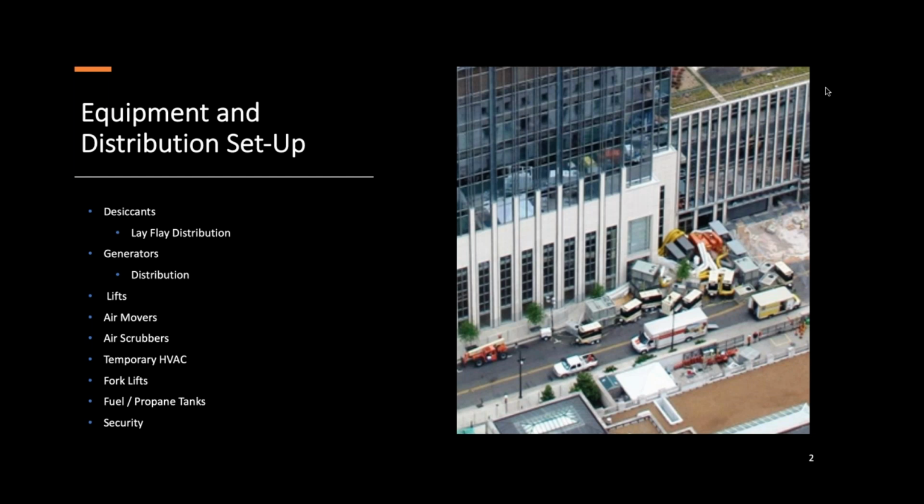You also have air movers that you're going to need to set up on a water damage, air scrubbers on a water or fire damage, temporary air conditioning. Going to need to order a forklift. Nothing worse than waiting on equipment to arrive on a job site for about 3 hours, 4 hours, or maybe even the next morning, and you get your equipment there, and then all of a sudden you realize, oh no, I need a forklift. So you call the local forklift rental place, and they're a half a day or an all day out getting you a forklift, and then you're sitting there very unorganized.